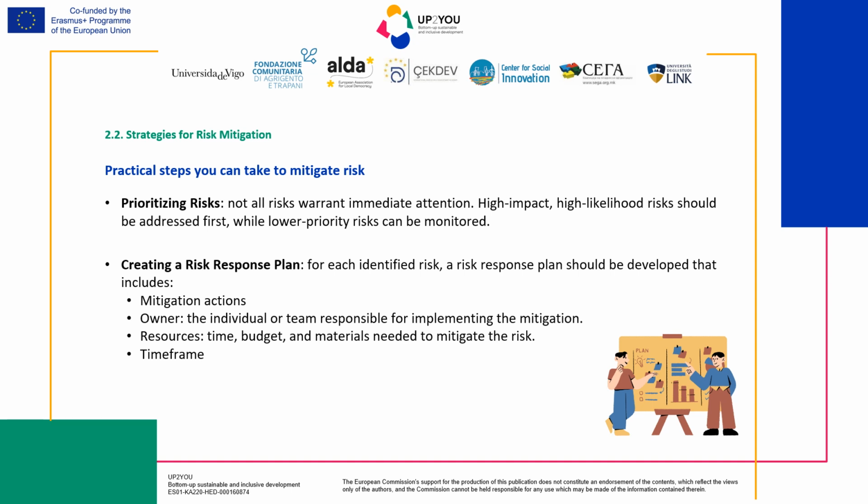How can we do that? Of course, with a plan. For each identified risk, a risk response plan should be developed that includes an owner, who will be responsible for executing the mitigation action. Assigning ownership ensures accountability and ensures that the response plan is carried out effectively.